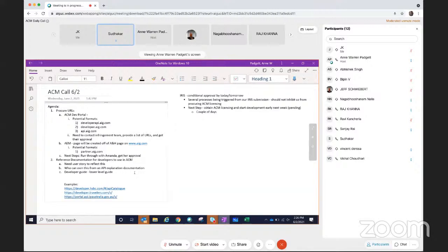Okay. So how long does that typically take to crank out? Is that like a couple of weeks or what? Yeah, I would say 2 weeks. 2 weeks, so an iteration? Yeah, one iteration. Okay. I know we've got a fairly full iteration next for this upcoming iteration, but Abhishek and Naga, when do you guys typically start creating these guides for the APIs? Are we in a spot where we should go ahead and start now?